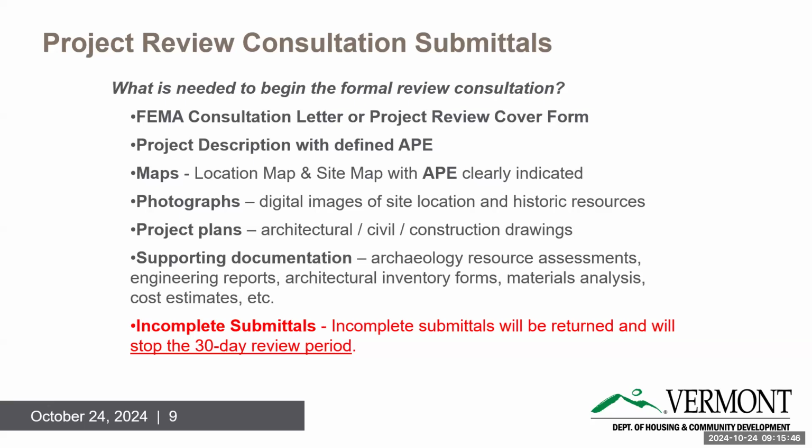Project plans. I know sometimes you don't have project plans right away at VTrans, but it really helps anything you can give us. And as those project plans keep changing, evolving, getting more detailed, it really helps to keep submitting them to us. And any supporting documentation, archaeology resource assessments, engineering reports, architectural inventory forms, cost estimates, safety reports, all these factor into how we're reviewing and what matters.